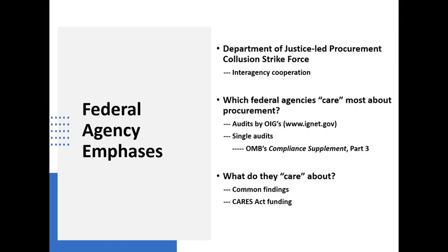I can't tell you the number of times I've seen solicitations, particularly in the solicitation for services, where somebody will put out an RFP and say, we're soliciting the following kinds of services. The budget for this is $50,000. That guarantees you're going to get a lot of $49,000 offers.